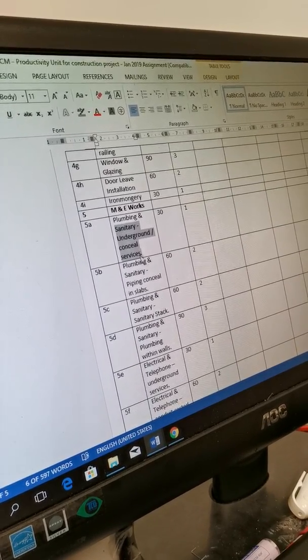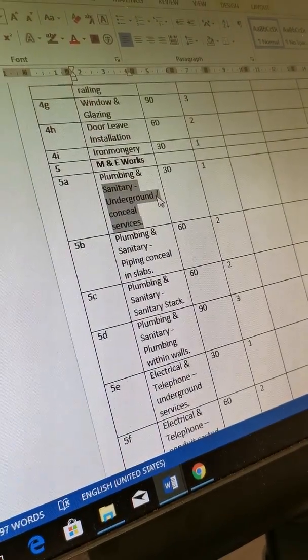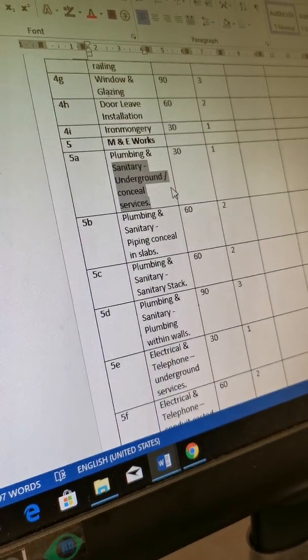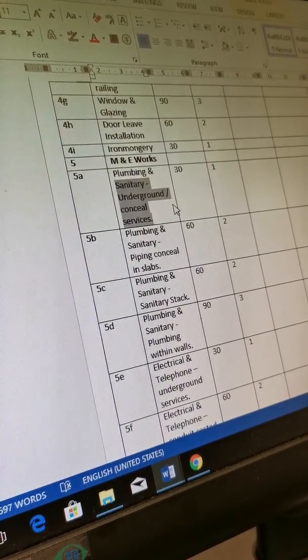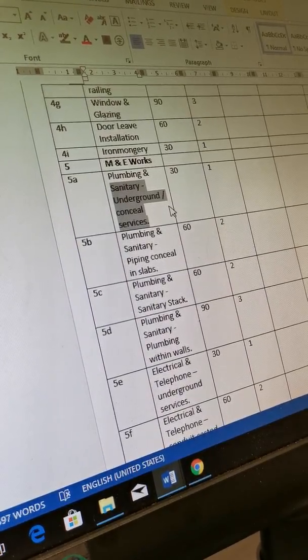If you don't have this one, let's say you put the plumbing on it. More often than not, I can assure you, your plumbing will be after your frame and everything, then your plumbing starts. Then if someone asks you one question, how to put that one inside there below ground? Oh, sorry, wrong already. Start, you reschedule again.